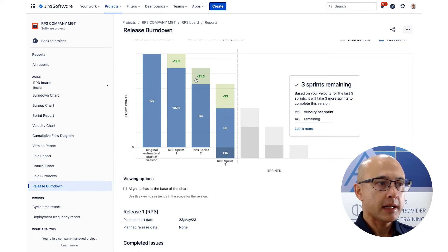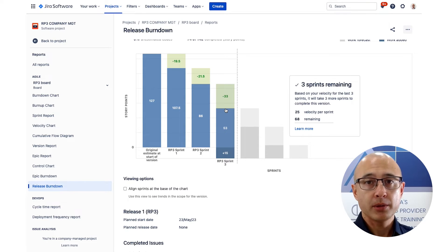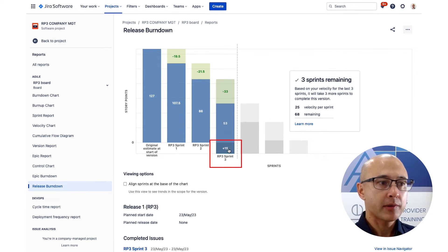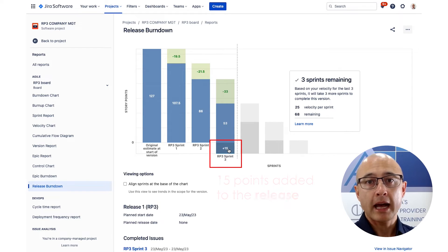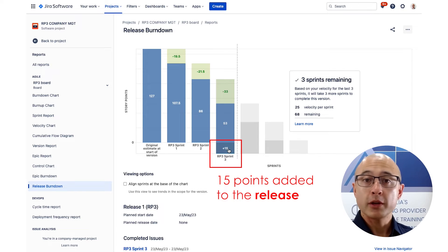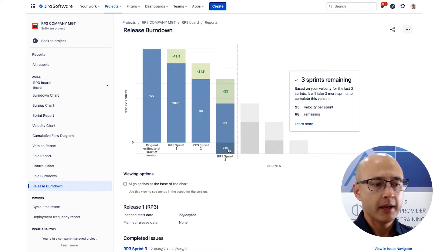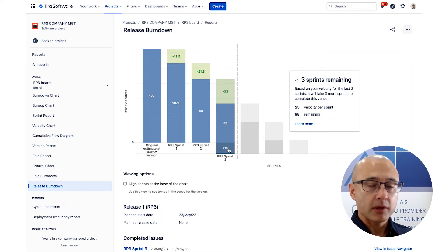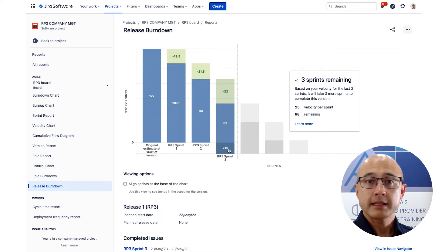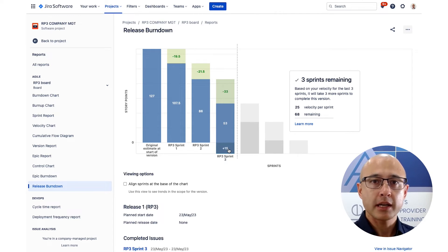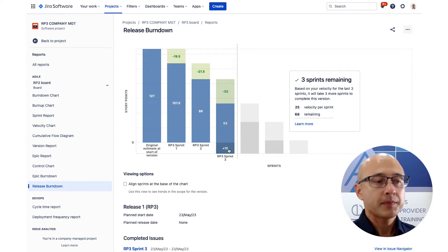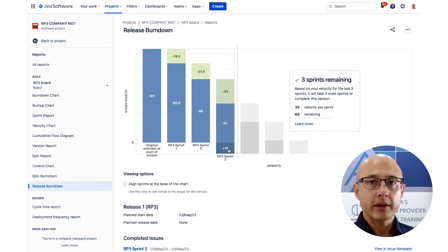We can gradually see the team getting through the work through the blue bars, and we can also see work added to the product backlog, visible as the darker blue at the bottom. In sprint three there was an additional 15 points added. This is very useful — you can present this burndown to stakeholders and, if you're off track, show them why. For example, you can say it's because new product backlog items were added due to stakeholder feedback or changes in the industry, and then work with them to decide what to do.